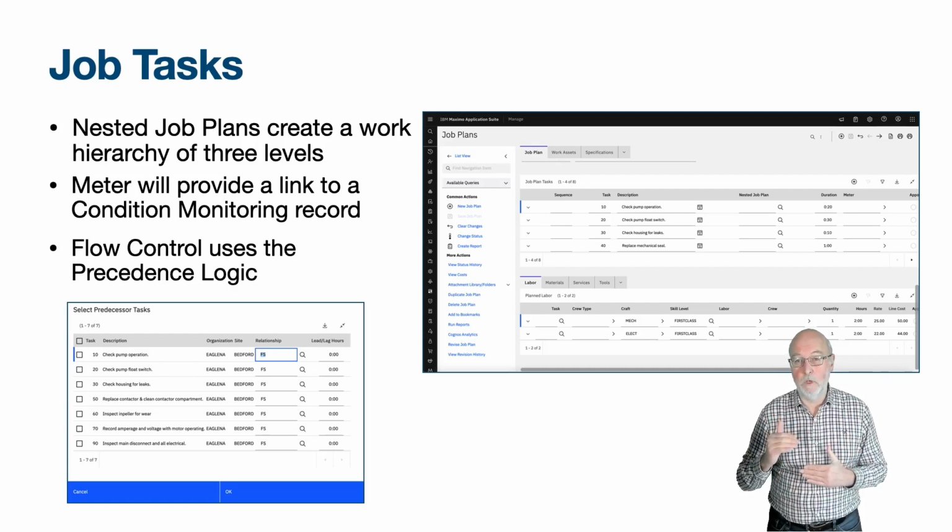A word of warning on the work order: the inherit status changes field should not be set, as you do not want the parent work order status changes to roll down to all the children tasks when the work order has reached the point at which flow control is activated, which is normally in progress state. Therefore, you probably need a way of resetting this field at the status immediately before in progress.